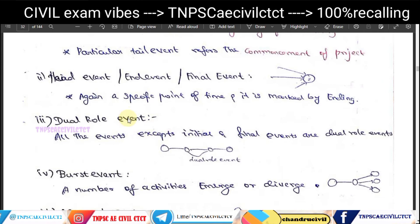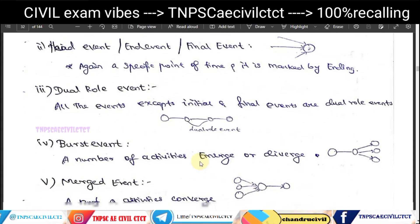The third type is the dual role event. All events except the initial and final events are dual role events. A dual role event acts as both the end of one activity and the start of the next, continuing through the network. The first and last events are not dual role events.